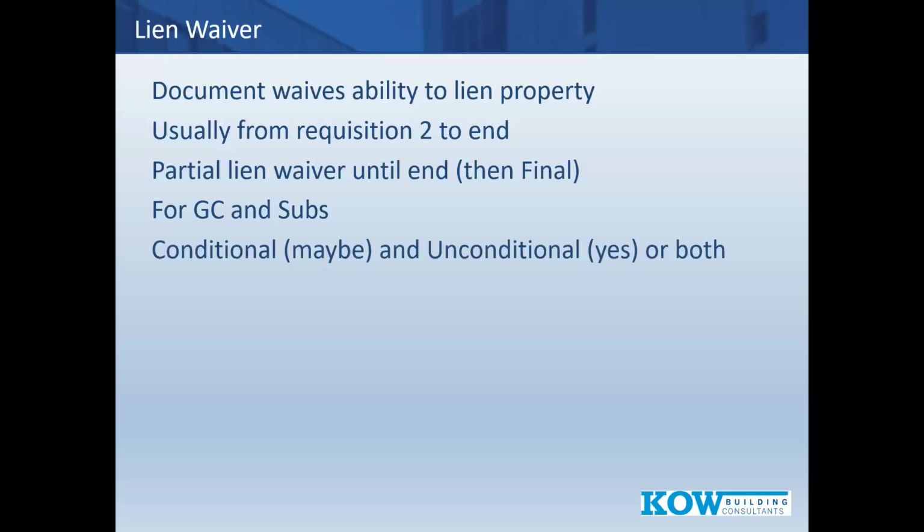The other thing I'll tell you is that we like to see partial waivers of lien that have 2 numbers on them, conditional and unconditional. And remember, it's like conditional love and unconditional love, there's no question. Unconditional payment is through last month. It's paid. It's absolutely out the door paid.